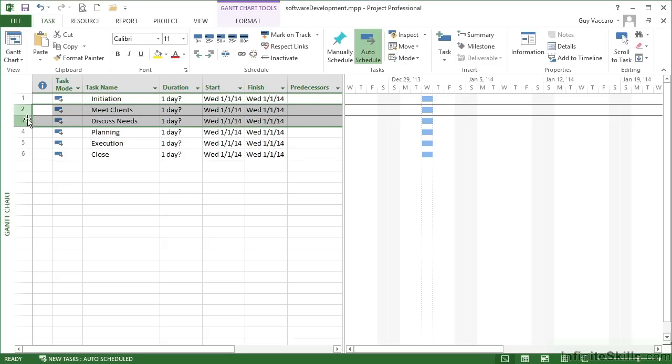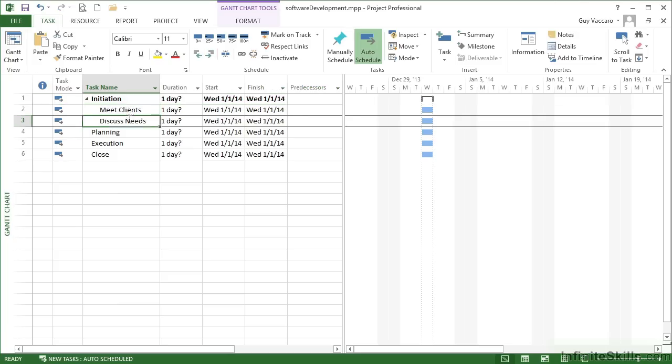On the task ribbon, within the schedule group, there is this little icon here that if you click, it effectively indents meet clients and discuss needs to become sub parts of initiation. So now initiation is a heading, a summary task as far as project is concerned, and these two phases are subtasks of initiation.